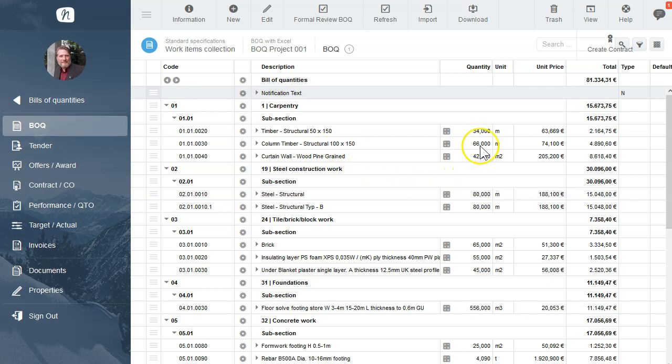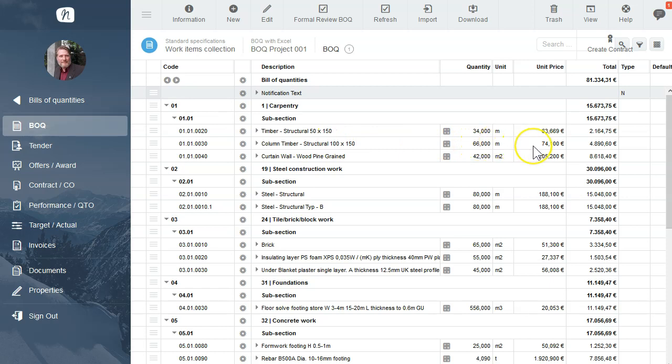Now we want to use our BOQ in tendering. We have the materials, we have the quantities, we have the unit, we have a unit price but this is only a cost calculation price and now we want to receive real prices from our constructors. One possibility to invite the constructors is to create an Excel tender document.